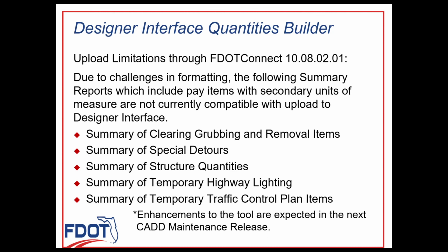For now, we recommend leaving these files out of the XML and entering any quantities from these summary reports manually in Designer Interface. I'll demonstrate what happens when you include them in the upload in a bit. We expect the enhancement that will allow us to process these files to be delivered in the next maintenance release of FDOT Connect.